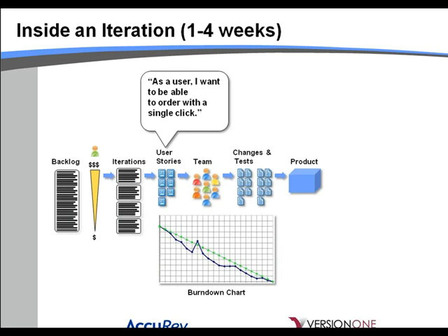Now, that doesn't mean we're going to necessarily release. That means we have something that could become the product. We have the bits needed to actually run it, demo it internally, test it internally in our test environment or what have you. And we could start the release process, but that's a separate choice that we're going to make. So in Agile, the iterations and the release time frame are completely separated.